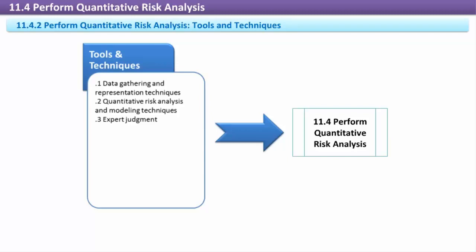Tools and Techniques: Data gathering and representation techniques. Quantitative analysis may require additional risk data that can be gathered from estimates obtained through interviews and expert judgment. Quantitative risk analysis and modeling techniques include sensitivity analysis, decision tree analysis, expected monetary value, modeling, and simulation help to quantify risks and their impacts.